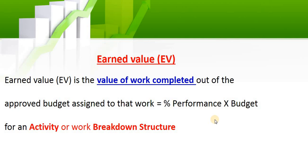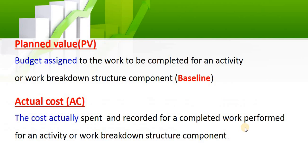Earned value is the value of work completed. How is this measured in P6 or in software? It is your performance percentage multiplied by your budget at the activity level or at the work breakdown structure level. Planned value is the budget assigned to any activity or WBS element, and it mainly comes from the baseline.